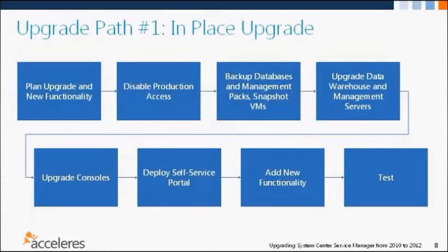So if you're going to flip off the legacy service level functionality and start using the new service level management capability in Service Manager, if you are going to configure that self-service portal, many folks will start using service requests immediately. And you may need email notifications and list values and views, additional user roles created around these. Once all of that's done, it's time to add that new functionality. And then, of course, at the very end, testing.